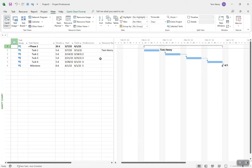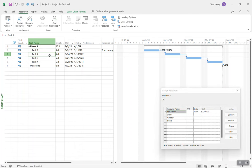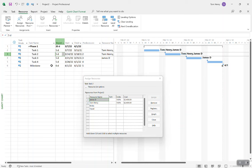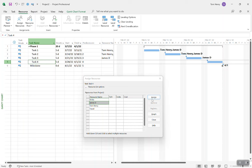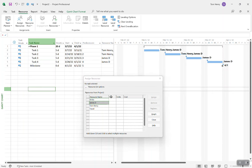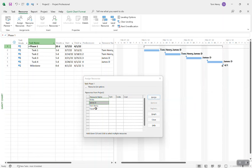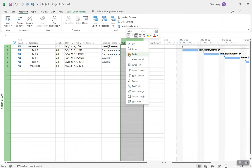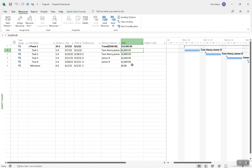We've got our project set up and our resource pool created. Now I want to start assigning resources. I'll use the Assign Resources dialogue — I love this because you can assign the same resource to multiple tasks, or assign multiple resources to single tasks. It works in the background like a widget, and it's updated in real time. I can also assign Travel to Phase 1 and say there's going to be a cost of $500. Now I can start seeing the cost of my project racking up.